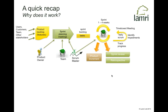At the end of a short block of time — one to four weeks — we've got a little slice of the system that we've built and tested. We can then demonstrate that to the customer, which is an immensely powerful technique. It flushes out misunderstandings that traditionally get left right to the back end of the project — we find them quickly now. And there's a retrospective: the opportunity to feed back, learn what went well, what didn't go so well, and what we can do better next time.